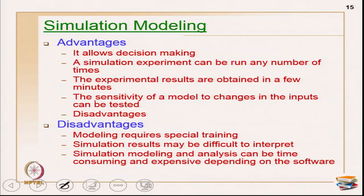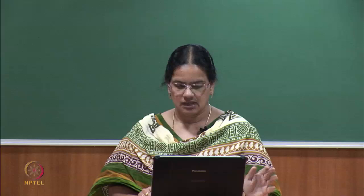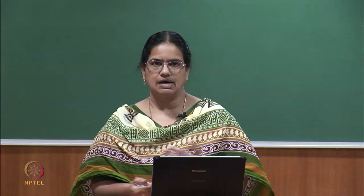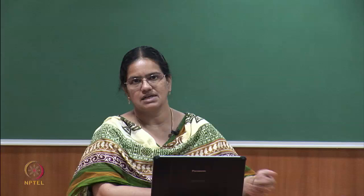A simulation experiment can be run any number of times. If not comfortable with results, change some parameters and run again. If still not happy, modify parameters, change the network, run again as many times as you want. Experimental results are obtained in minutes or seconds once the model is created, rather than doing it manually. The sensitivity of the model to changes in inputs can also be tested - for example, if a truck breaks down on the 11th trip causing a 2-3 hour repair delay, you can model what happens to the overall duration.